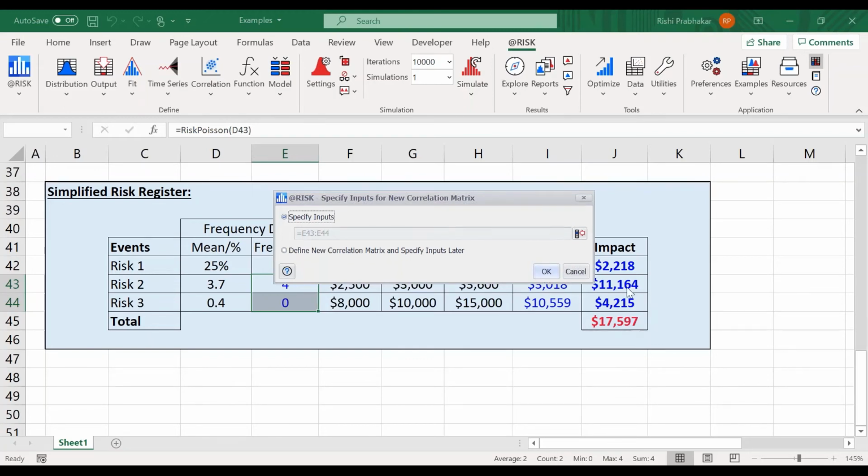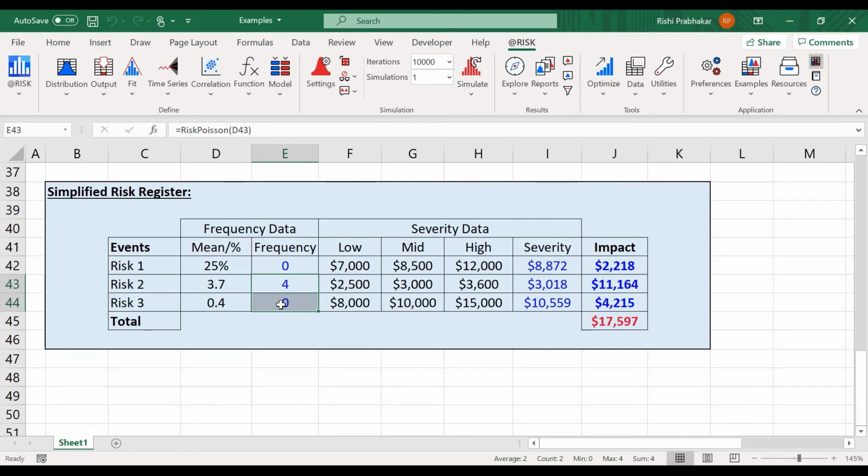And that correlation will then flow into the calculation. The sum itself is just going to sum up these numbers, whatever they are. And if they happen to include components that are correlated, then that will necessarily be included in the information of that sum. Now, in terms of correlation, the frequencies can be correlated because they happen prior to compounding. These severity distributions are simply indicative distributions of what needs to be sampled. In a way, they don't exist. They have to be on the spreadsheet somewhere, but they're not an actual outcome that can be correlated directly.